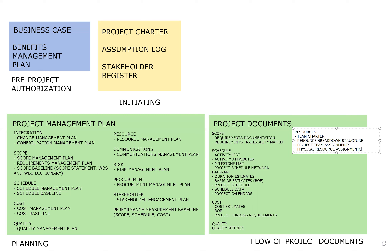Your team charter is a document that identifies good behaviors, bad behaviors, expected behaviors of the team, ground rules, and things of that nature. The resource breakdown structure breaks down resources by type and category so you have a visual and can account for anything missing — it includes both physical and human resources. Project team assignments refers to paperwork showing assignment of people; physical resource assignments is paperwork for physical resources such as servers, backhoes, lorries, trucks, and material resources.